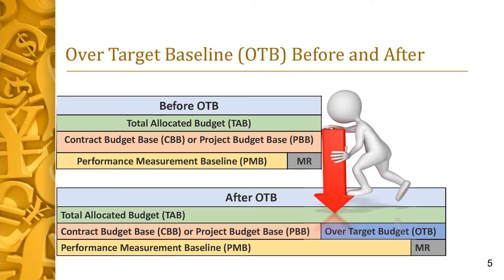Total allocated budget is above the CBB or PBB and includes the CBB or PBB plus the OTB. This graphic illustrates that the baseline target, i.e., the CBB or PBB, is unchanged, and the PMB is changed by adding budget to create an executable baseline based on the recognized significant overrun. An OTB may not affect all the work in the baseline. A partial OTB does not affect all work breakdown structure (WBS) elements in the PMB, and does not make across-the-board cost schedule variance adjustments.